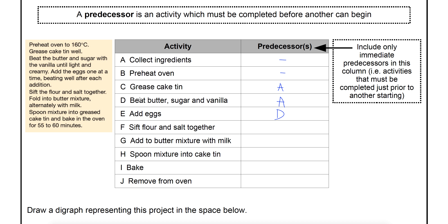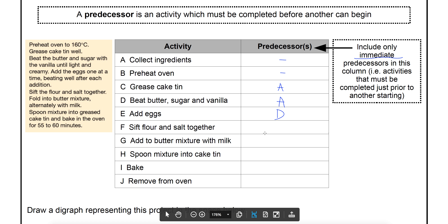Note that to do D you needed A, and to do E you needed D — but we're not going to list A as a predecessor of E as well. We only list the things that come immediately before it, not everything that comes before it, otherwise this table is going to get very full because you'd be repeating A for everything that comes after D and E. So for F — sifting the flour and salt in a different bowl — you don't need the butter beating done. Really, the only thing that needed to be done is you needed your ingredients.